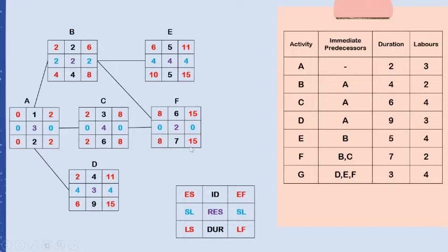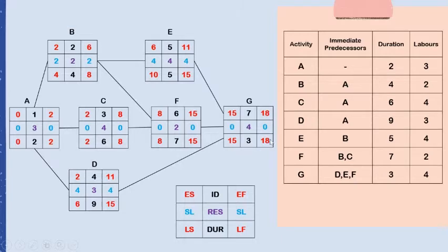Once B and C are complete, we can proceed to activity F. For activity G, the immediate predecessors are D, E, and F, so all three must be completed first before proceeding to G. For the latest finish and latest start, we derive these from the project due date. The earliest finish and latest finish share the same due date, and the latest start is calculated as latest finish minus duration, giving us fifteen.